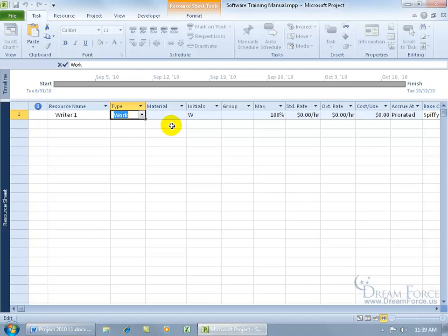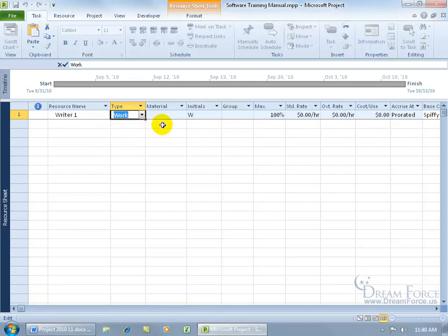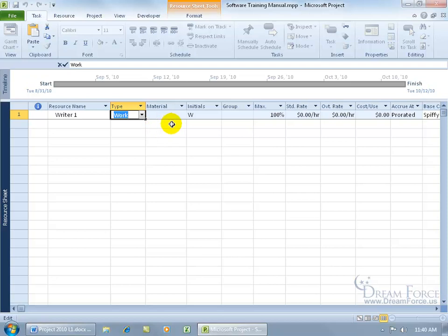Like for example, if you type in shingles, that can be measured in cases. Or if you type in reams, that can be measured in paper, like a ream of paper contains 500 sheets. So if my resource name is plain paper, and the type would be material, of course, then the material label could be reams. So when I go ahead and I assign that resource to a task, it will be assigned as one ream of paper. So that's the label for the material and how it can be measured in, or the unit of measurement.